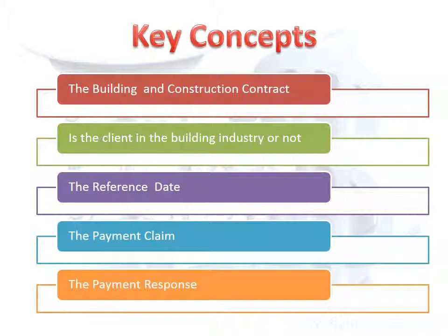When a payment claim is sent, the client should respond with a payment response. A payment response states what amount the client will pay, if any, and if the client states it will pay less than the amount in the payment claim, the client must state the reasons for not paying the full amount. The two documents of payment claim and payment response are the key documents which set up how you proceed under the Act. We will deal with this in detail later.